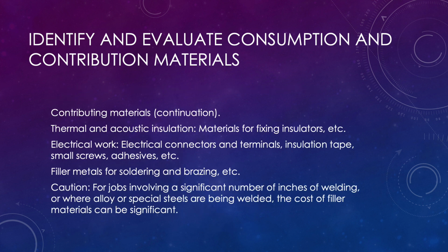Thermal and acoustic insulation, materials for fixing insulators, etc. Electrical work, electrical connectors and terminals, insulation tape, small screws, adhesives, etc. Filler metals for soldering and brazing, etc. Caution: for jobs involving a significant number of inches of welding, or where alloy or special steels are being welded, the cost of filler materials can be significant.